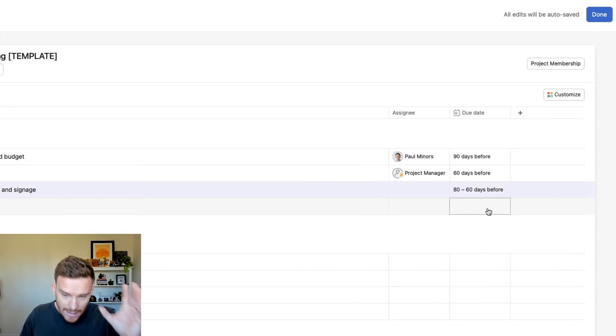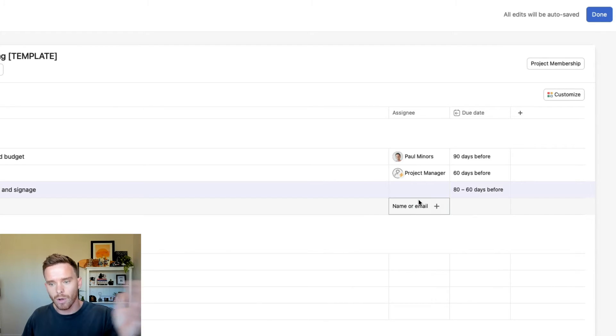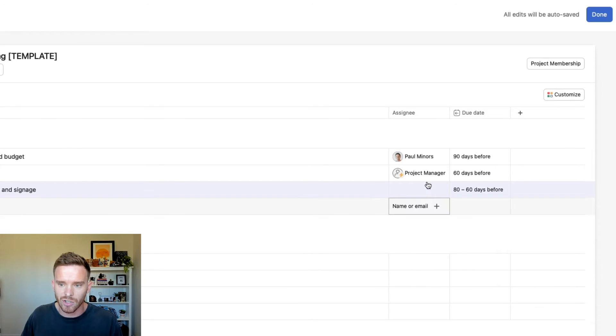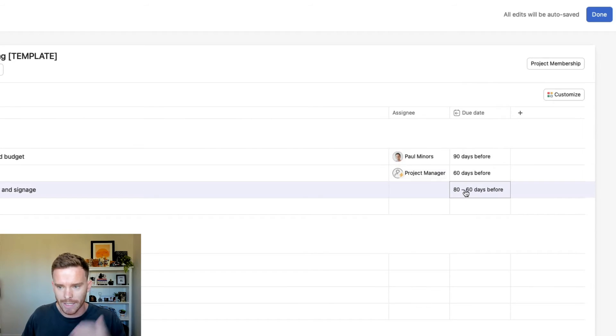So that's the next thing I would do for this template is I would go through, make sure I've assigned my tasks to either a person or a project role, and I would put dates on everything. So what I've described there would be the essential steps that I would take when creating a template. So setting up your project with sections, tasks, subtasks, and milestones to break down the work and create your checklist.